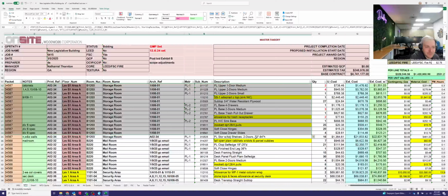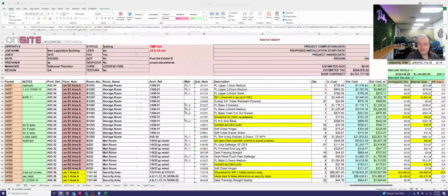Now, there was a note here about soft close hinges and slides on this takeoff. During the handoff meeting we did confirm we were going to be switching to self-close hardware, so we will be ignoring that note here. A lot of times soft close is more expensive, so they will price it differently when they think we have it on the job. So we're going to try to get by with using self-close hinges on the job for now. If you go to the handoff meeting, which I'll show you where that's located here, you'll be able to see that in that meeting recording.